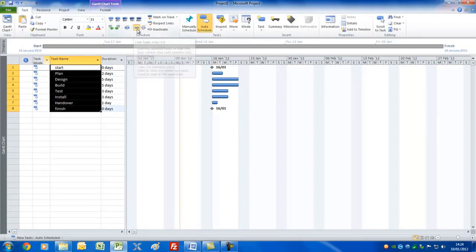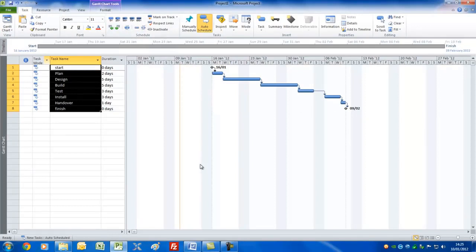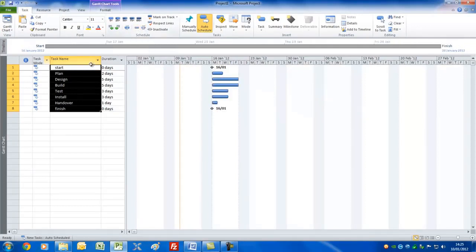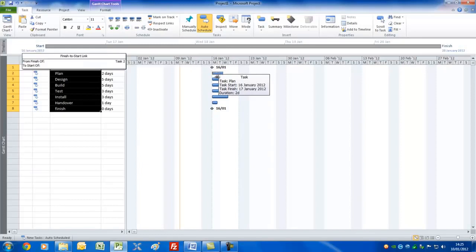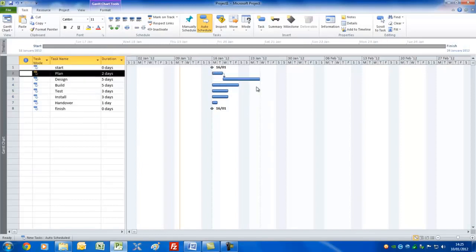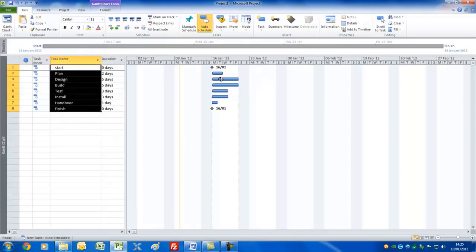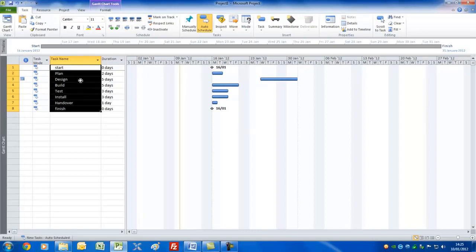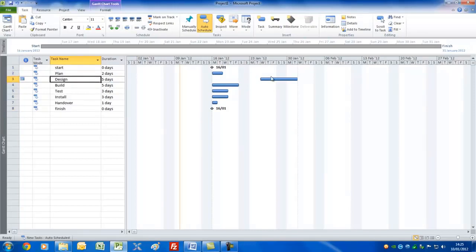Now we could link all these tasks together by selecting them all, going to the Task menu, and choosing the Link tool. Alternatively, you can overlay the mouse on a bar itself until you get a four-pointed cross, then click, hold, and drag downwards — that would link them together as well. I'll undo that and show you something else.